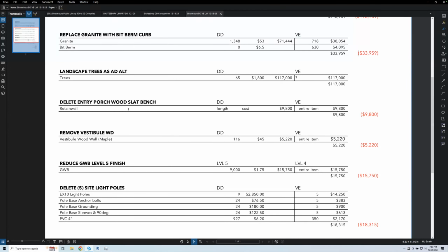I would only add that to meet the conditions of the order of conditions, all work has to be completed within 3 years. So it is possible to spread that out over time and perhaps find some savings. 3 years from the time that the order of conditions is issued. Right. It's really more like 2 years after, yes.